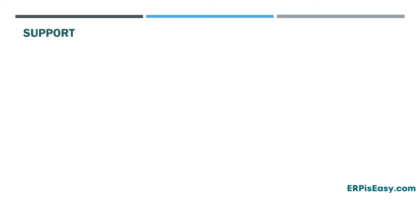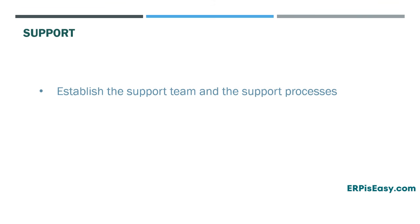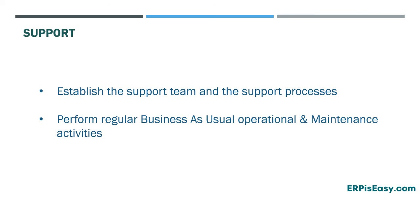Then comes support. Usually there will be four to six weeks of hypercare support provided by the support team. During this time, all defects will be treated with the highest priority and resolved as soon as possible. Once the hypercare period ends, the business as usual period starts and the normal support process kicks in.